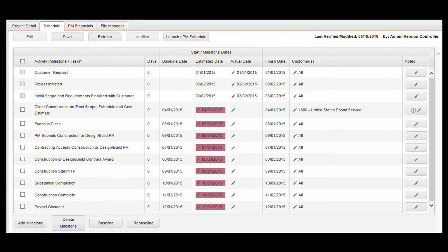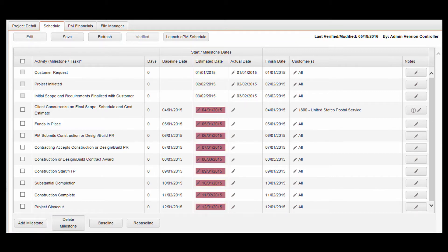To remove a milestone, select a milestone by checking the box to the left of the activity, then clicking Delete Milestone. Enter an estimated date for each milestone. To baseline a milestone, select it by checking the box to the left of the activity, then clicking Baseline. All milestones can be selected by checking the box in the header.